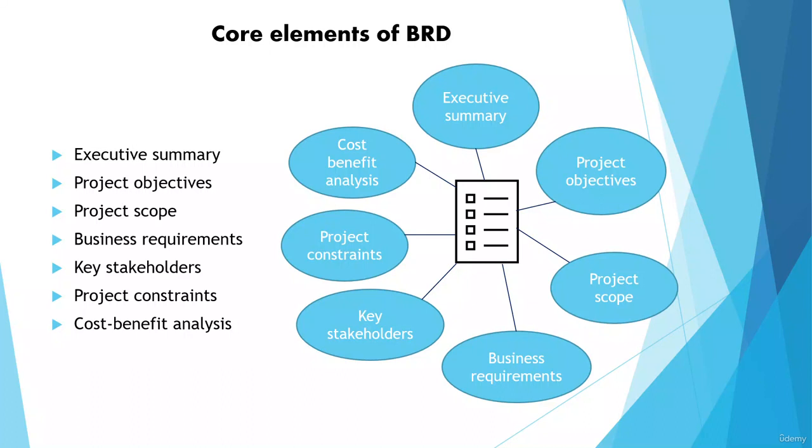And next comes the cost benefit analysis. You will end your BRD with the cost benefit analysis. If you're using the BRD to get approval for the project, this section will be a deciding factor, because your clients and executives care about the project objective. But if you can't prove that you will make profit, then it's all a loss. To create a cost benefit analysis, describe all the costs associated with your project, explain the benefits, write the total expected cost and estimated costs